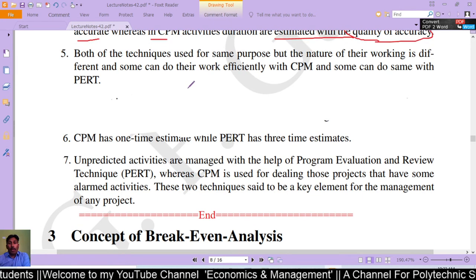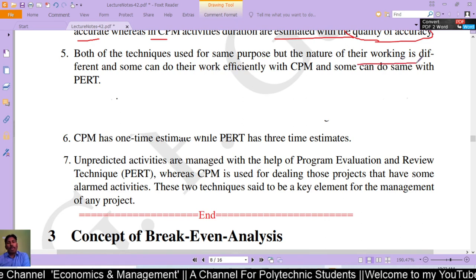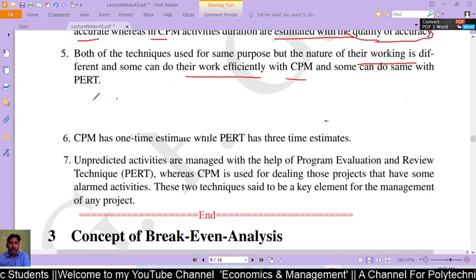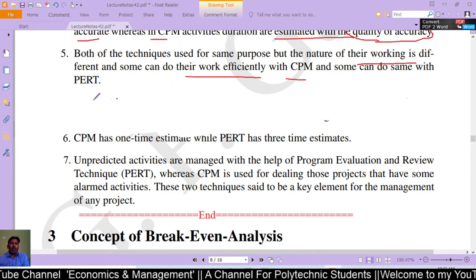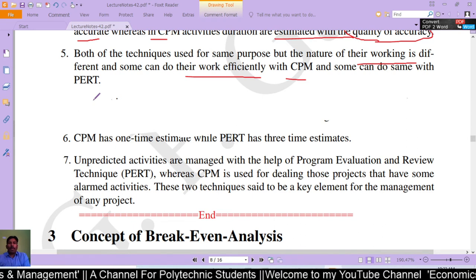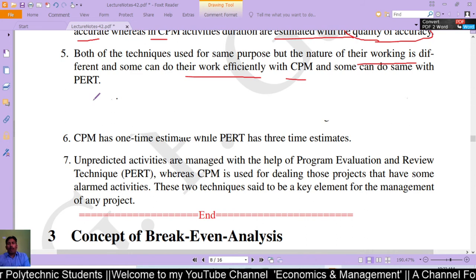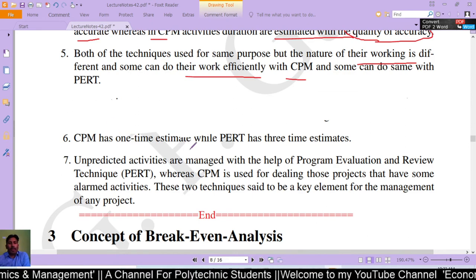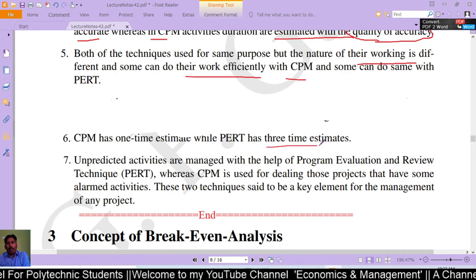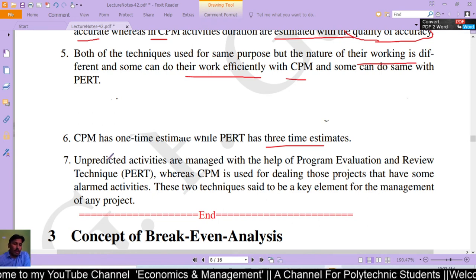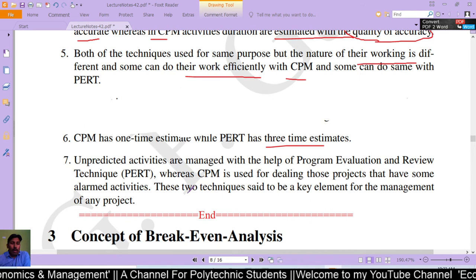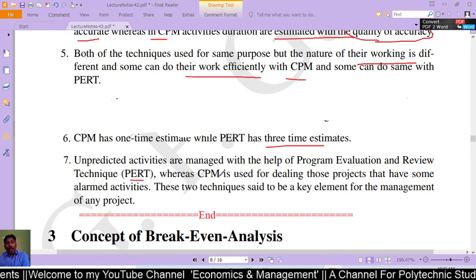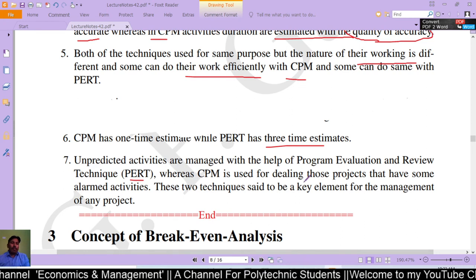Both techniques are used for the same purpose, but the nature of their working is different — some projects can be done efficiently with CPM and some with PERT. CPM has one time estimate while PERT has three time estimates. Unpredicted activities are managed with the help of Program Evaluation and Review Technique, whereas CPM is used to deal with projects that have well-defined, predictable activities.